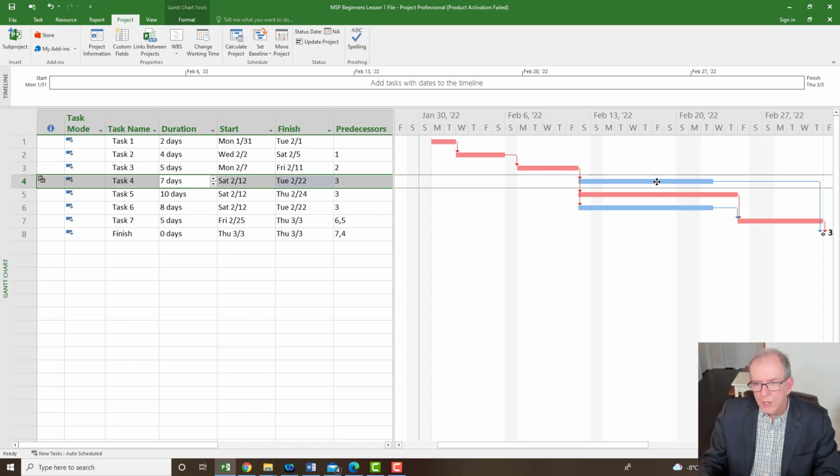Now, you might not understand or remember that you created that calendar and assigned it. And so then maybe you're going to look at that later on and say 7 days. All right, there's 5, but wait, 7 days, 7 work days. There's 1, there's 6, that's 7, there's 8. Why is it showing 8 when it says 7? I don't understand. Well, that's what this little icon over here is.